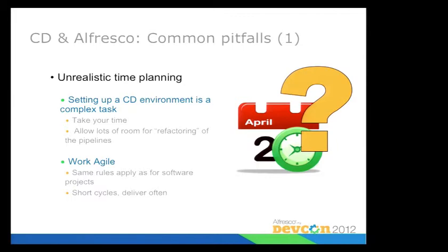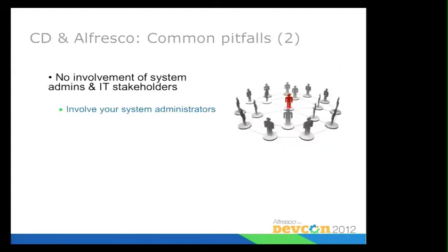Let's say that is the realistic time. You have to keep in mind it will take you almost a year to set this up in a working environment if you want to have something that scales. If you have only one project, it's much easier if you're using it in-house, if you're not developing other projects as a partner of Alfresco for other customers, but only using it internally. I'd say 4 or 5 months will be enough to implement it.